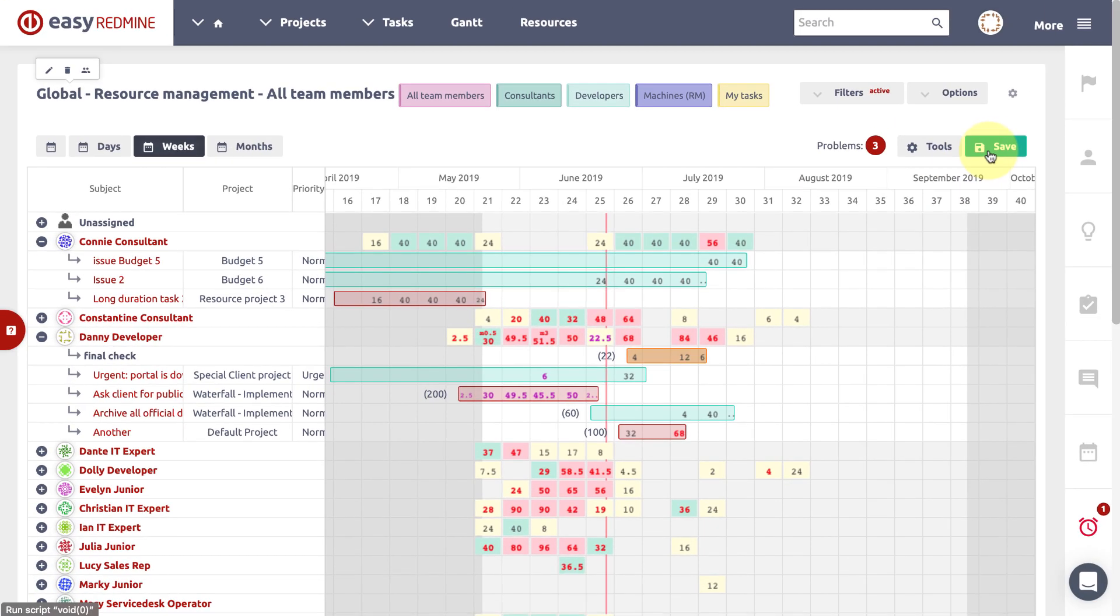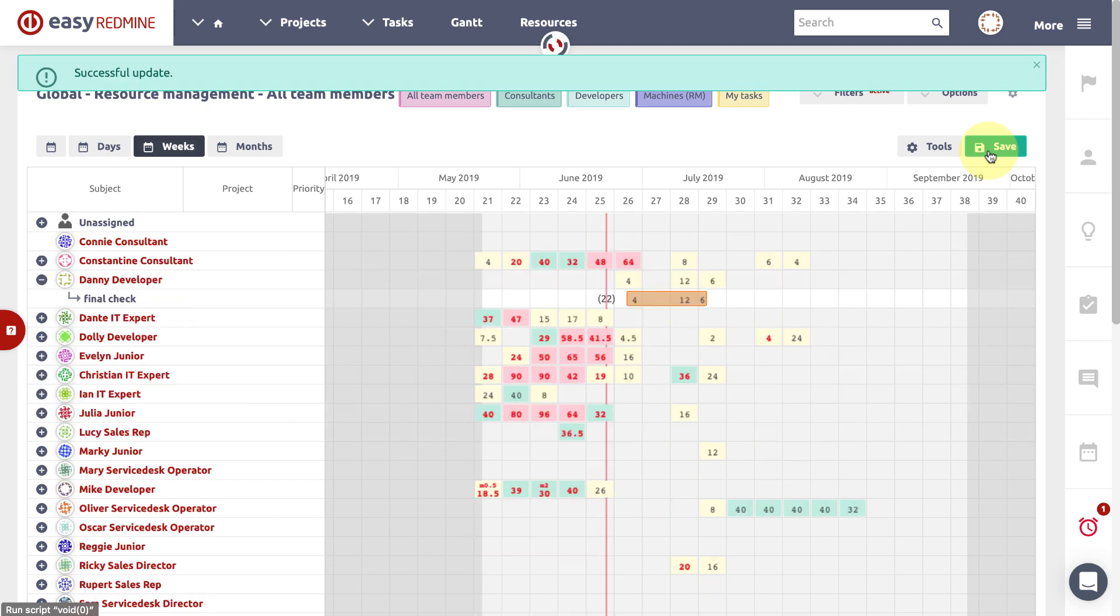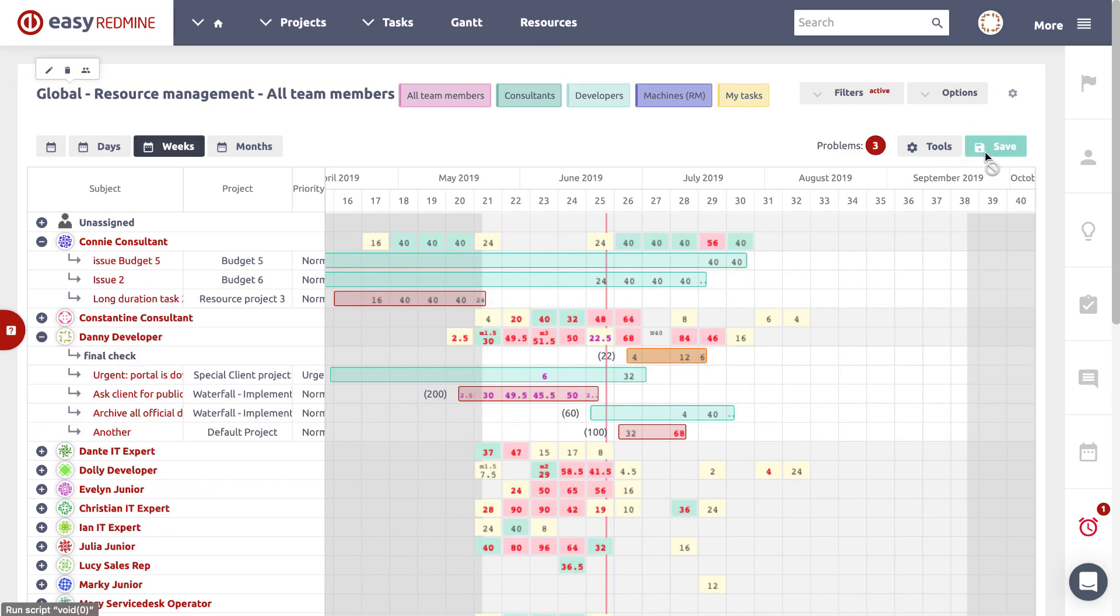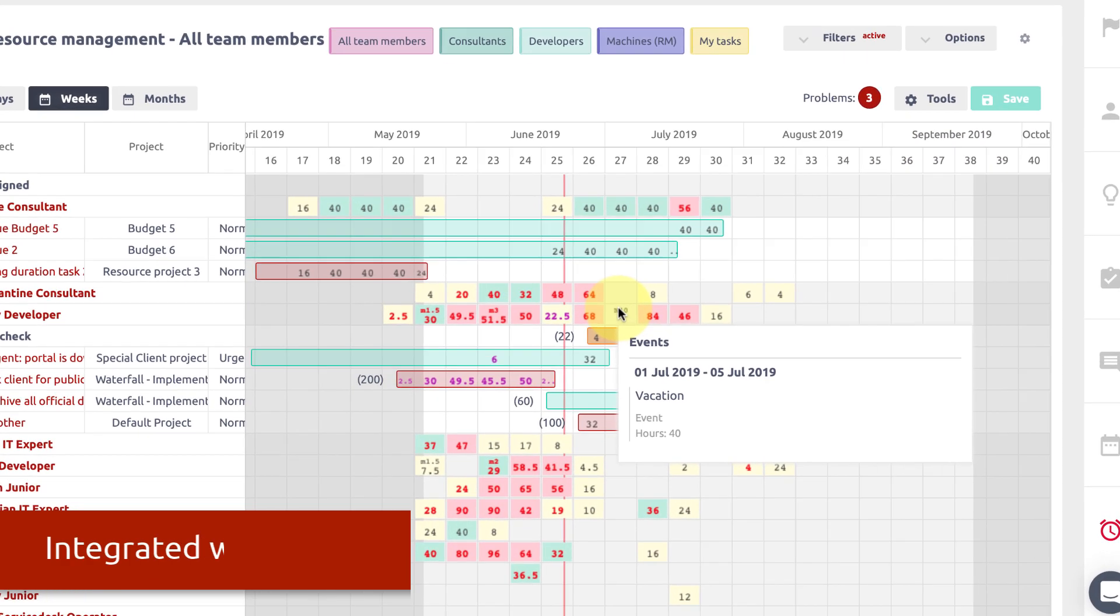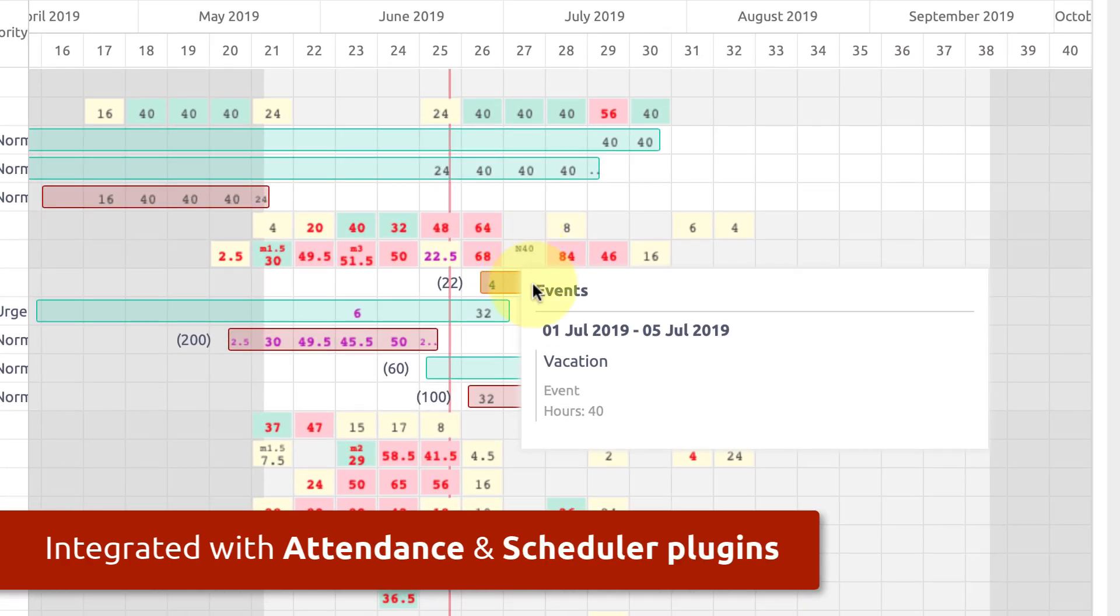Resource management is integrated with meetings and attendance where planned meetings, vacations, holidays are taken into account in workers capacities.